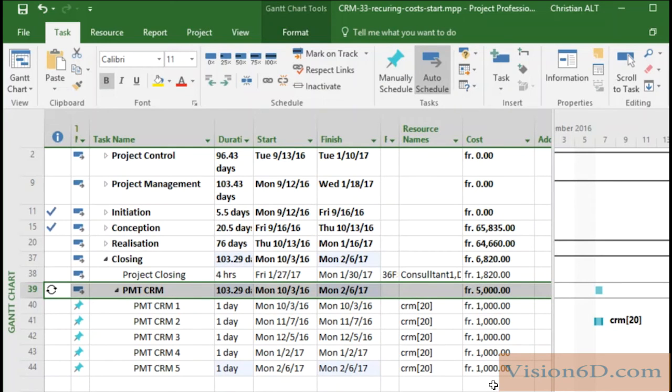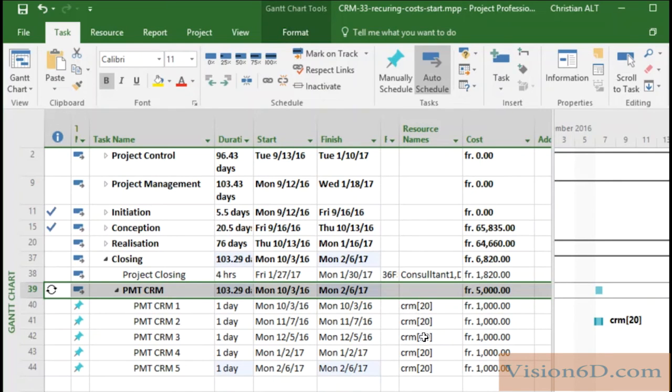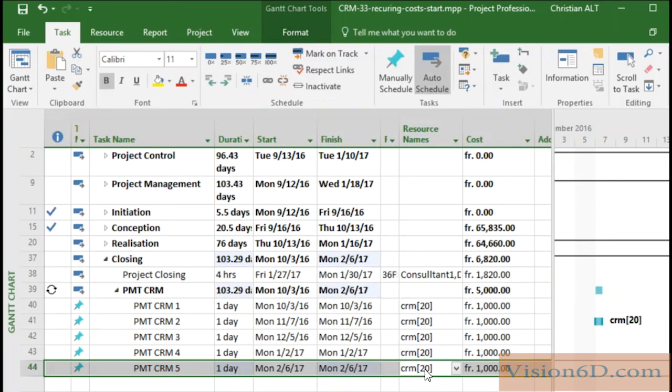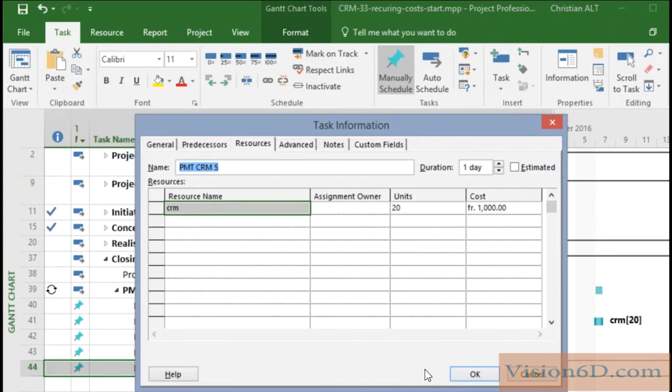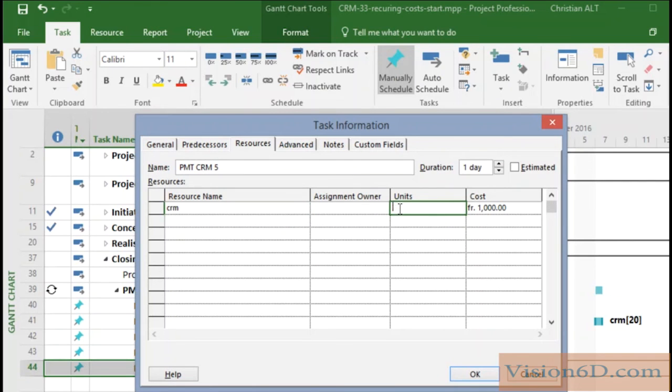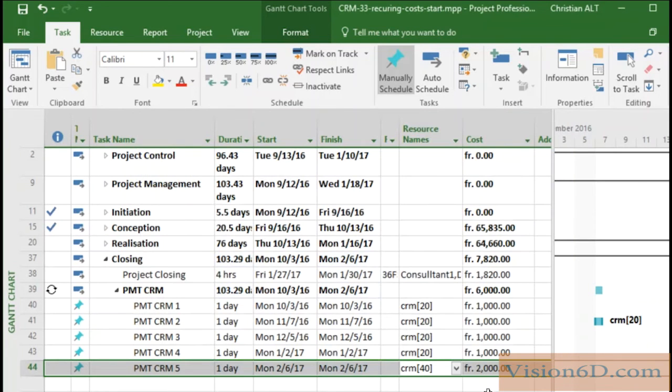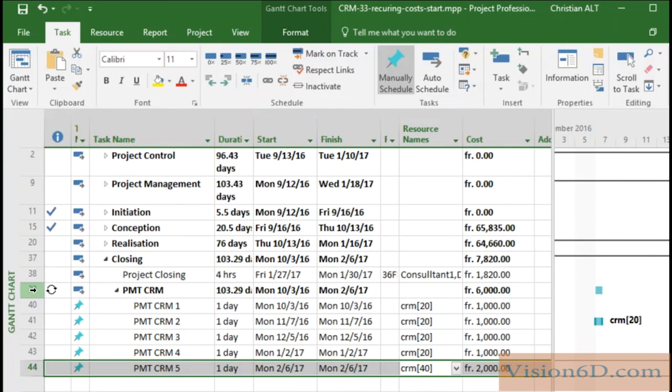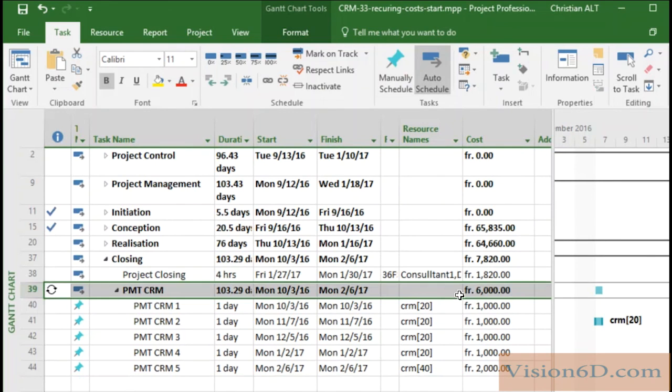So like that it's what I wanted to show you the way to insert recurring costs. Of course if during the course of the project you need to extend the number of licenses for some of the users, let's say that at the last point when you are really into the tests you maybe have way more users at that time. So you could easily here increase the 20 to 40 for example and we'll see what happens. And you see that the cost of the last payment has changed now to 2000. And of course the summary here up of the cost of this part has raised to 6000.